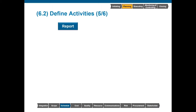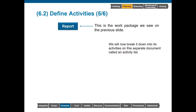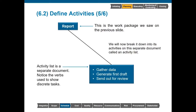So we take our report — this is a thing, a noun. Anytime we are dealing with a noun, we can be pretty sure that it is a component of the deliverable. We can then break it down into the discrete activities that must be completed to prepare this report. Very importantly, we see verbs starting to appear. With nouns, we're dealing with components of a deliverable; when we see verbs, now we are doing things — doing things to create things. So we are gathering data, generating a first draft, sending out for review. The verbs tend to be the giveaway that we're dealing with discrete activities.